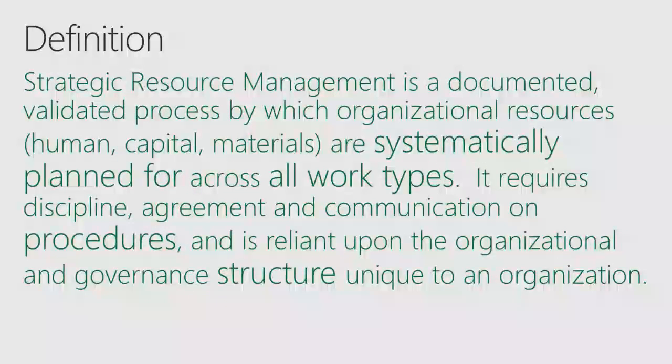Just to give you an overall definition of what we're talking about: strategic resource planning and resource management is a documented process or procedure by which an organization manages its people, its equipment, different types of resource, anything or anybody that would work on a project at any point in time or any non-project activity. So we're going beyond just project work into non-project work. We find a lot of IT and business organizations spend 40-50% of their time not on projects but on other activities, whether it's break fix, keep the lights on, administrative stuff, or special work for certain people. You have to be able to track all of your different kinds of work.